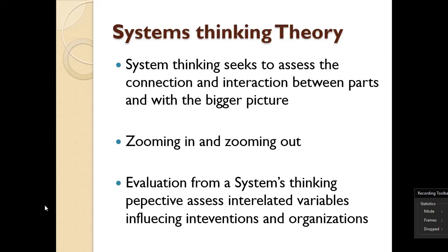how the implementers are doing. Let's say, for instance, you are building a house. The efforts that the porters would use depend on how effectively you remunerate them. Are you paying them on time or not? If you are not paying them on time, some might be absent on certain days, and therefore the work would go down. If you are not buying enough cement on time, then the labor is challenged, and therefore performance is challenged. And of course, if performance is challenged, then your outcome, the structure, might not be up when you had intended to have it up in 2 weeks.